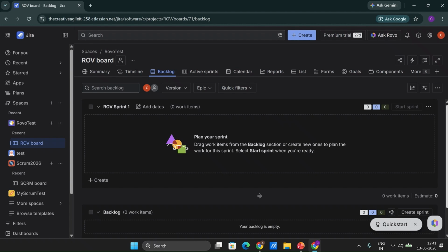Normally when teams work in Agile Scrum, they have two primary definitions. One is the definition of done. That means, whenever the team says a user story is completed, on what basis are they saying so? What steps have they undertaken, what have they considered, what is the checklist? For example, whether they have done the review or the QA. It depends from team to team. Each team is going to have a different definition of done as well as definition of ready. And definition of ready is how we ensure that our user story is complete and ready to be undertaken in a sprint.